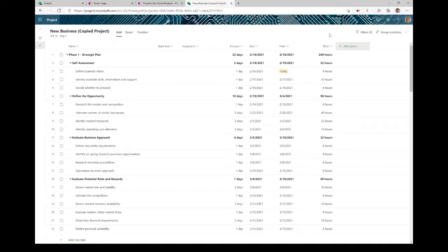So if you had work in your previous schedule, this is now called effort in Project for the Web. What isn't retained is the assigned to. This is information that is linked up to Active Directory, so users, actual users, are in this system. So it doesn't take into account the resources that you had. You will need to fill that in again.